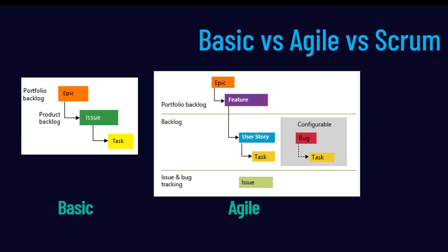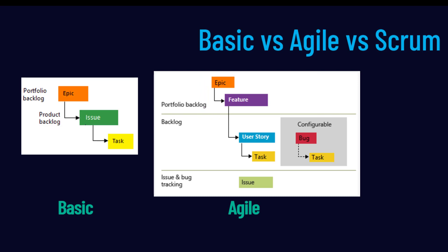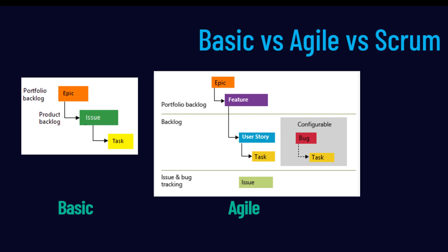Next is the agile process type, where the entire process is divided into three different categories. At the top you have epic and feature, which help define your portfolio or project backlog and overall vision for the agile project or sprint iteration. Then at a more detailed level you create user stories and underneath tasks to complete those user stories, and if there are any issues you can create an issue related to the user story.